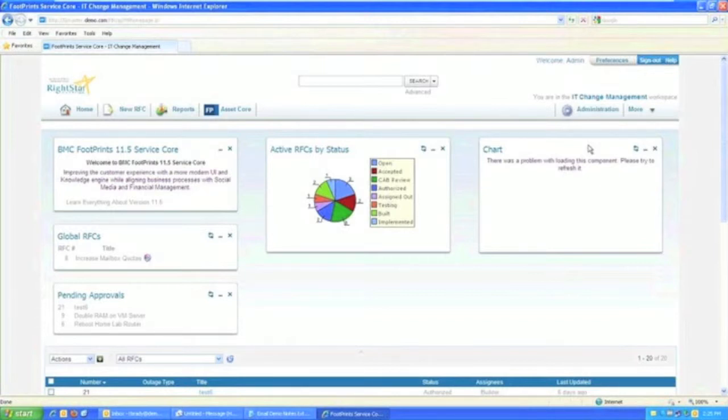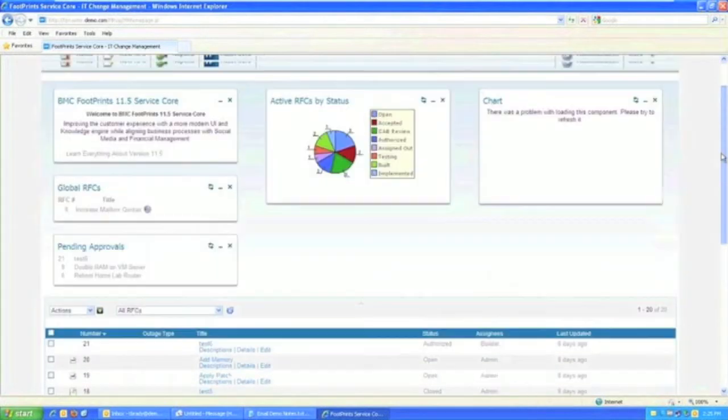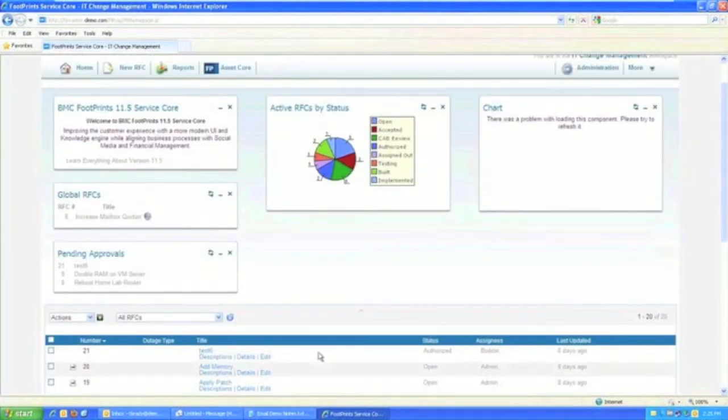oh, here's part of a server cluster running these applications. If it's really important I get that patch applied, I could go on and take them down one at a time and do that because we really wouldn't lose the ability to continue to run that particular service. So having that level of detail becomes very important.